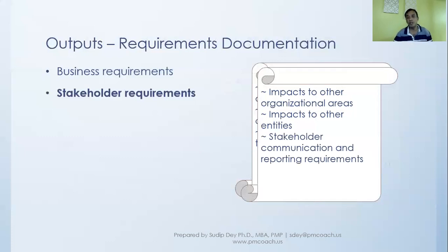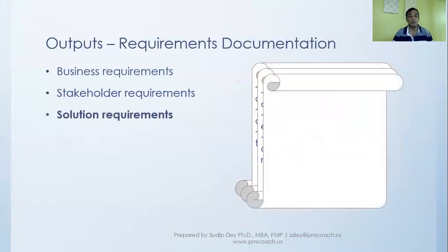The stakeholder communication and reporting requirements: how should we go about communicating with the stakeholders that we have identified, and what are the reporting requirements? Because remember, they will be different from stakeholder to stakeholder, and we should not think that one report sent every week to everyone is really a nice way to communicate, because everyone has their own preferences, and we'll talk about it in more detail in the communication module, or communication knowledge area.